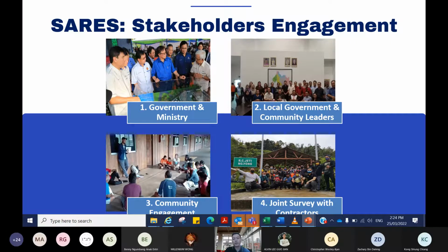This is important also because the challenging part of this project is mainly due to the locality of the village. When the contractor goes to site, they will know how to quote on the transportation of the equipment to site, because some of the villages are very tough to access and some of them are easy to access, right?